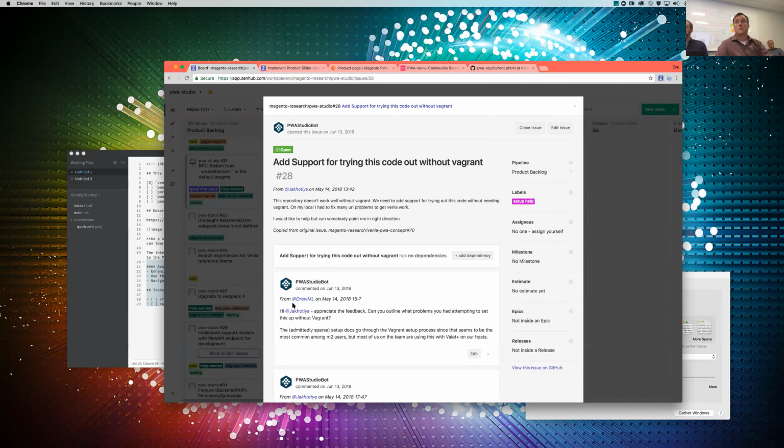Does anyone feel like, and again, this is a research and development question, so estimating it has mostly to do with how long you believe it would take to arrive at an answer to how hard it would be or arrive at a scope. This is like a scoping exercise for a scoping exercise, but that's Agile.